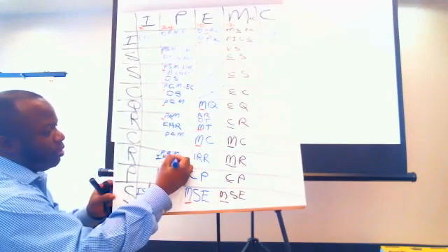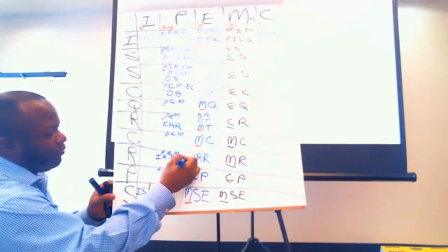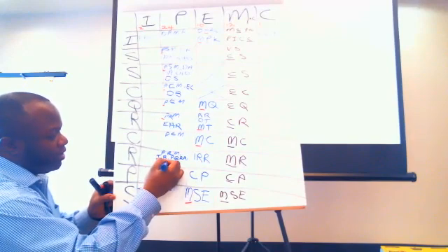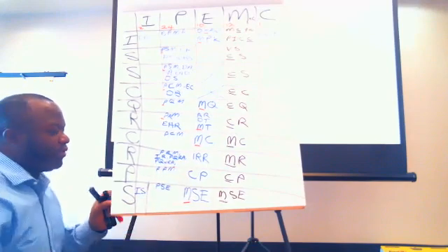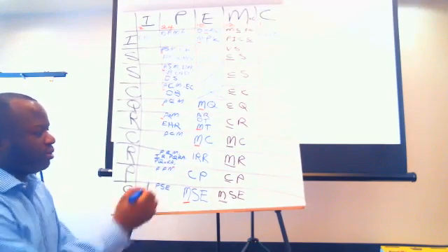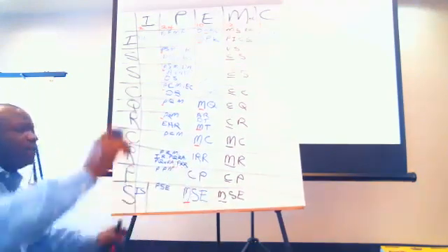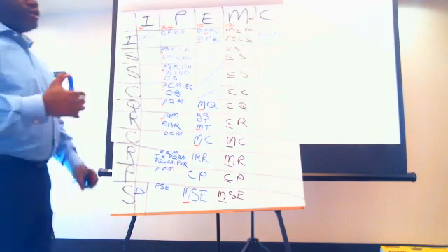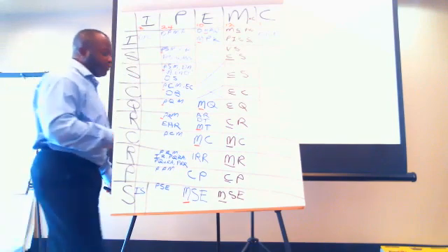Then you perform qualitative risk analysis before performing quantitative, you could say QN, risk analysis. And then what happens after you've done your analysis? You plan risk responses. Good. So you can see, I don't write all the names out, otherwise it will take too long. But the sooner you guys get this down, the better it's going to be for you.